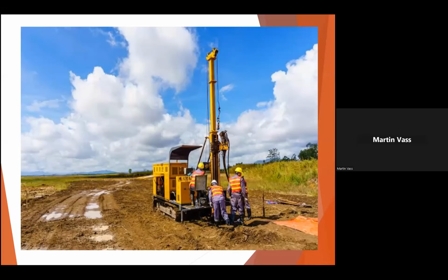So the first thing they do is they appoint a geotechnical engineer. A geotechnical engineer will go out to site, and as you see on the slide here, they take cores. They drill into the ground, and they extract cores from the ground. And from those cores, they can establish what kind of material you're going to be constructing on.